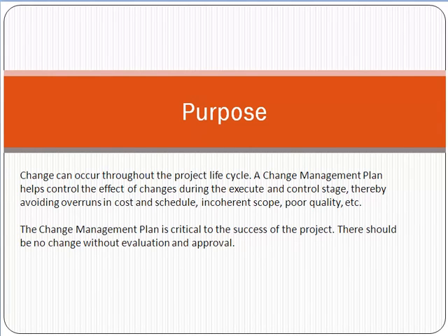If you don't have the change management plan, there are high chances that a change comes from the customer, and because you don't have a regular or defined procedure for change, there are very high chances that your cost could overrun, your scope could creep, or your schedule could be missed. Why? Because you don't have the proper change management plan in place. So these issues can occur in a project.